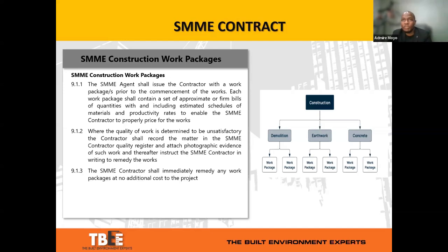Yeah. And then in terms of the work packages, we've defined whatever work is allocated to SMMEs in the form of work packages, and one essential ingredient about the work packages is that the level of satisfaction concerning those work packages will be recorded by the SMME contractor in a quality register with photographs attached and so on.